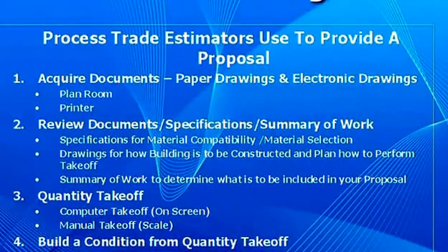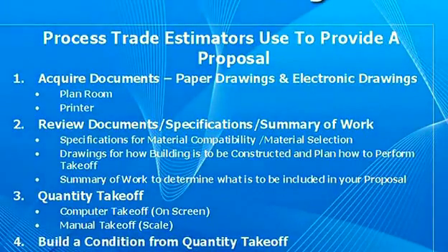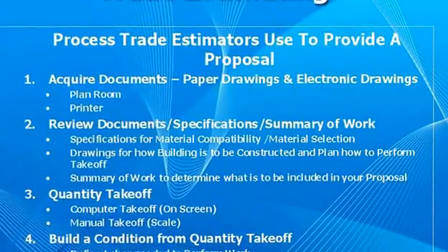So I have a format of how I'm going to start working. Okay, these are the spec sections we're going to include. Here's my base bid. There are 3 alternates or additional items that I need to price. I can put those on there now so I won't forget. I put in my qualifications: we exclude this or we include this, to make sure it's always there. I keep that right to the side of me, so whatever I'm working on, I can just put it right in my proposal. It never gets lost in translation.